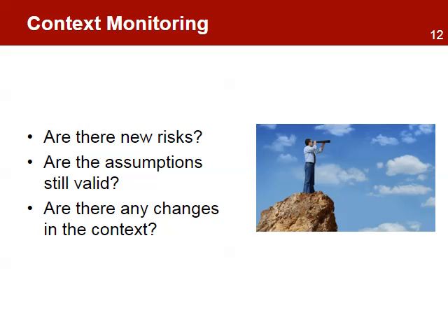Assumptions are favorable and necessary conditions for the achievement of results at different levels. The project manager should monitor any changes on the original assumptions. For example, an original assumption stated that the school would provide resources, but due to changes in the school budget, there is no guarantee that will happen.